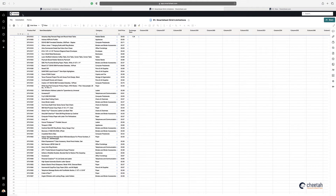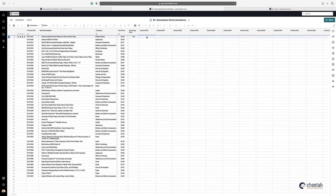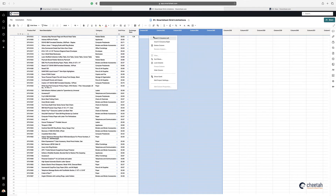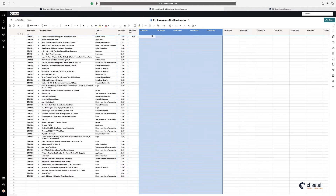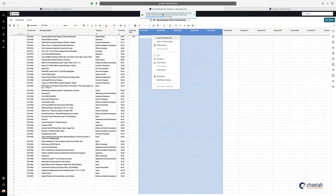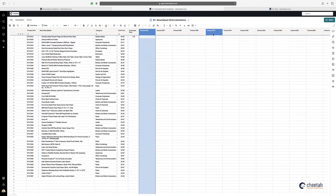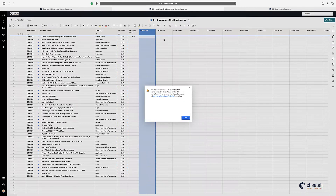The fourth limitation within the grid is that you can only have 400 columns in a single grid. At the moment I've got 360 columns, so if I start adding more — only five at a time — and work towards 400, you can see a message saying you're reaching the column limit of 400. If I try to add an additional one beyond 400, there's your limitation — you've reached the column limit within the grid.